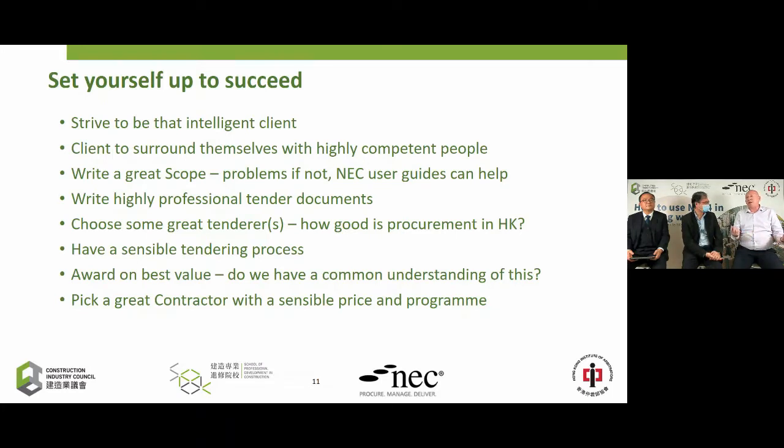In fact, why do we have negative cash flow? Why not start the contract off with positive cash flow? Why not seek a discount: I'll give you a quarter of the money up front now, what discount can you give me from the target or lump sum? But why not strive to be the best client in Hong Kong? Be that incredibly intelligent client. In turn, surround yourself with highly competent people.